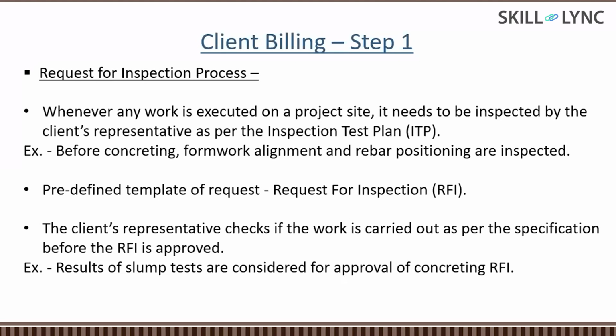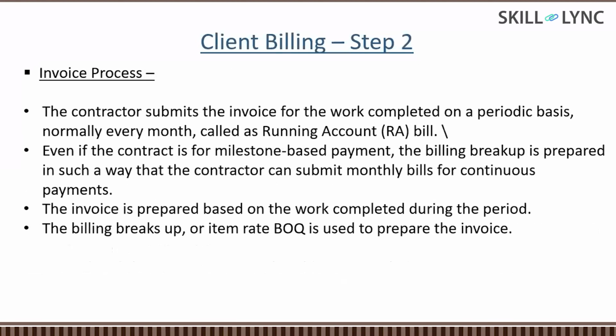So at the end of the month, once whatever things have been executed, all the RFIs and all the measurements that have been recorded in that RFI document will be available. Now, in step two, at the end of the month or at the end of the milestone, the contractor will be submitting the invoice for whatever they have executed. They will be raising the invoice as per the contract document.